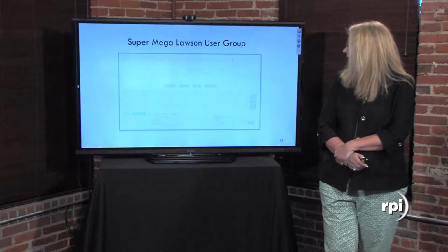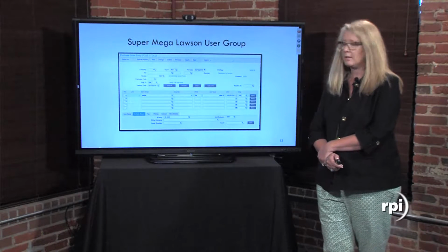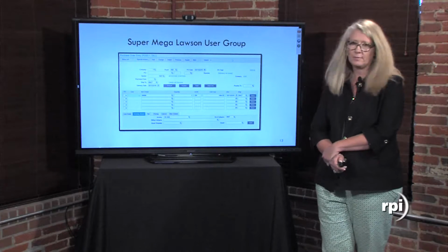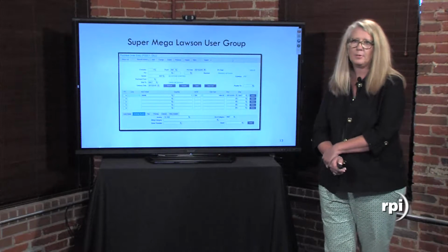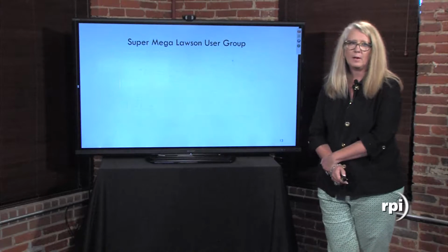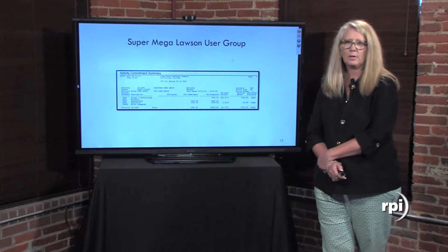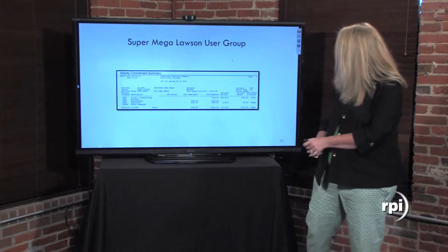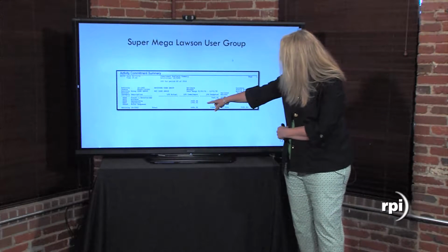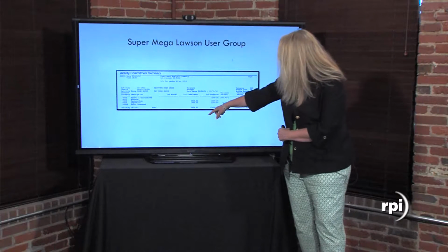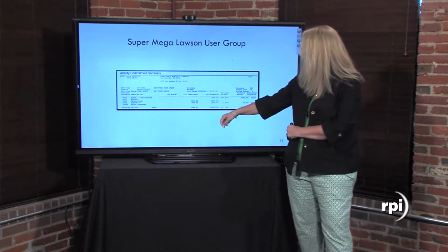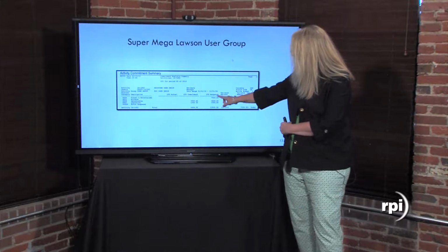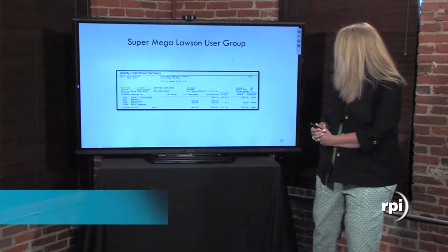He creates a PO for $1,464.50 for that conference room and projector. Now I can look at my activity commitment report, my AC 295 canned report, and I can see here that I do have $3,000 of a commitment for the sponsorship and $1,464.50 for the logistics commitment. You can also see that I have budgeted dollars of $12,000 for the Keystone User Group.